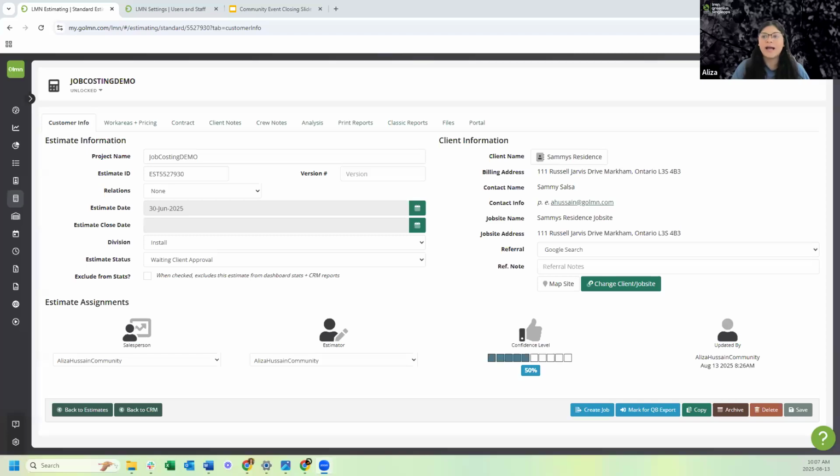And then finally, overhead allocation. These are your indirect costs like rent, admin time, and insurance. We all probably, when we created the budget, have a good understanding of what overhead is. Job costing will also allocate for your overhead. So not only will it track your cost of goods, but also your overhead. When you track these properly, you get a clear picture of how profitable each job is, not just what you estimated up front. Now, why are we doing a whole training for job costing when it's just comparing your actuals to estimates?